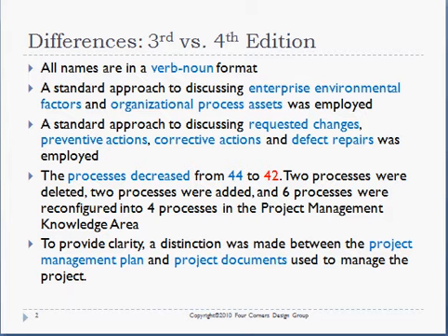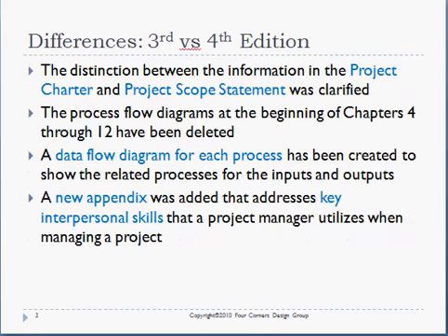The main differences are the verb-noun format, a standard approach to discussing enterprise environmental factors and organizational process assets, a standard approach to discussing requested changes, preventive actions, corrective actions, and defect repairs, decrease in the number of processes from 44 to 42, a distinction between project management plan and the project documents used to manage the project, a distinction in project charter and project scope,